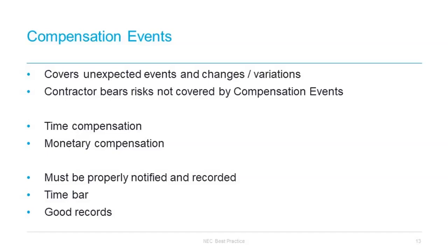Now, on compensation events, the other key aspect to be aware of is time bar. There is a set time limit under NEC within which you must apply for compensation events after a contractor becomes aware of them. Contractors should be aware that this is one of the most heavily amended areas of the NEC contracts.